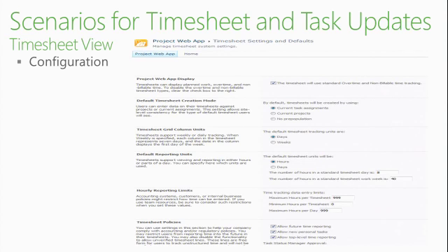If you want that to be automated, then I would imagine you need some kind of custom thing that will pop up and say you have more than so many hours there. The point he's trying to make is, if you set the maximum hours per day to 8, it will not allow you to put overtime. At the end of the day, if you put 8 and 2 overtime, that's 10 actuals. So it will not allow you.